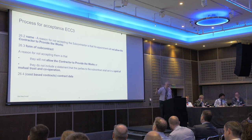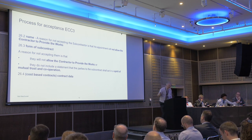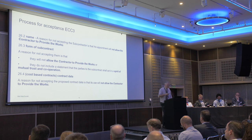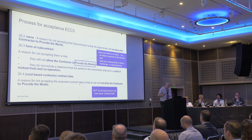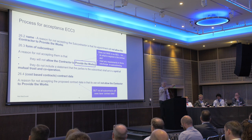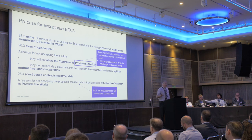In NEC3, at clause 26.4 on cost-based contracts — options C, D, E, F — you also provide the contract data. But do all subcontracts have contract data? They don't. A significant proportion of contracts used for subcontractors are not NEC, and therefore contract data may be completely meaningless.